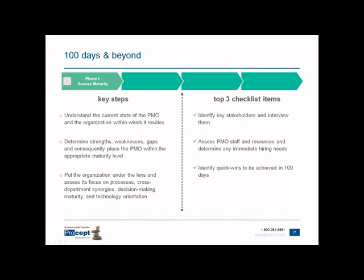Understanding those drivers is critical. When you do that, you'll start understanding the challenges from a project management perspective and get a sense of how much work might be needed to turn things around. Have a good sense of what resources and staff you need to help. Also identify the quick wins you can achieve in the first hundred days — for example, even creating a list of projects is a quick win because that gives instant visibility and transparency. Coming up with a brief status template can be very helpful. Giving some project schedule coaching immediately can also be a quick win.